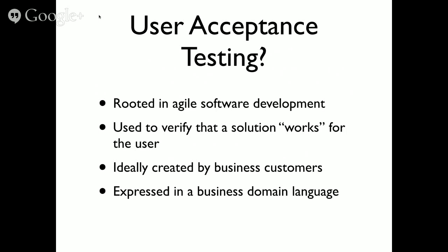This is the thing that kind of turned the lights on for me. If I've given a set of acceptance tests to a client and the client has signed off and said, yes, when you accomplish all these things, then I'll consider this component of the project complete. Well, that's huge, because then there's no ambiguity about what it is that you're coding for.